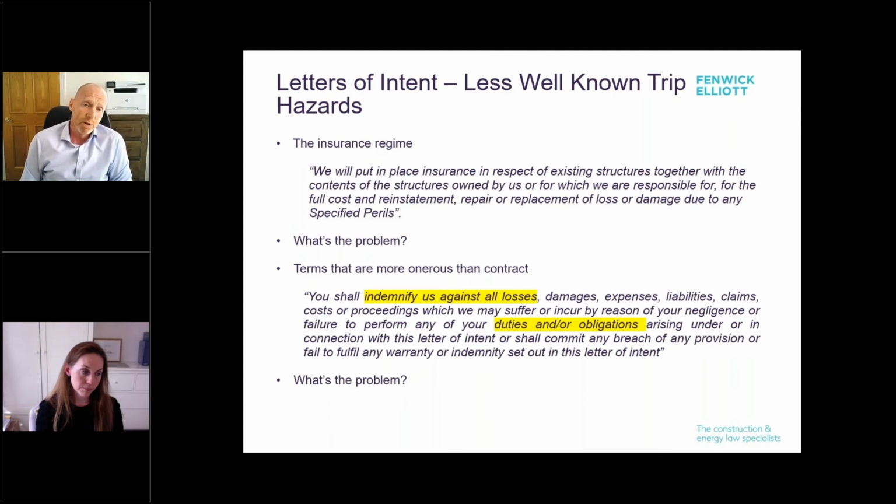All it says is the employer, it's just a statement, the employer is putting in place that insurance. Doesn't mention about letting the contractor off the hook. Doesn't mention about putting the contractor on that joint insurance. So you could look at that and think I've got the cover, but it's not enough to get you there, I would suggest. So if you are unfortunate enough as the contractor to set fire to the building on the Wednesday, that's not going to get you out of jail.